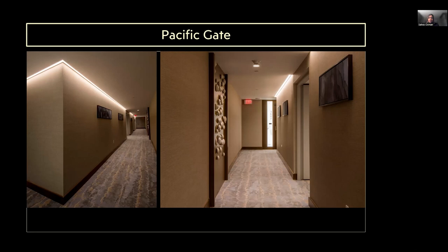So again, innovation: we went ahead and used a surface luminaire that was tweaked so that it would satisfy the energy requirements and also cost and aesthetics. We collaborated with the architect to build a slot in the ceiling so that the fixture just tucks in there, as opposed to creating this complex perimeter lighting, which, as I mentioned, is a very costly installation. So we were able to achieve the look that we were setting out to achieve, and we did that for 50% of the cost. So we saved the client 50% on the corridors.